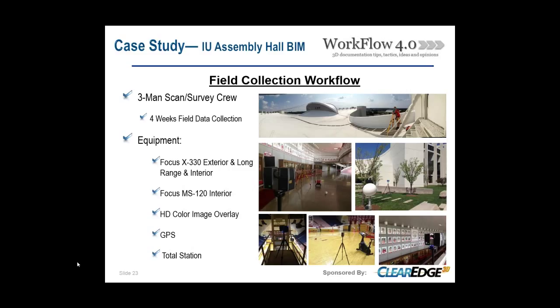We also did a sizable amount of this project in color. So we ran color overlays with a lot of the scanning as well, which for a project like this we thought was a nice touch, but it did add some considerable time to the field operations for this job.